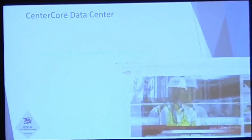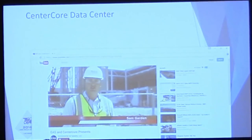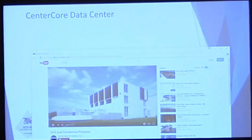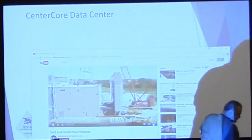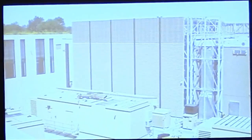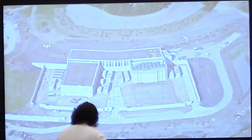I'm here on the site to show you a rapidly emerging trend in the data center industry. Behind me, you'll see the team putting together the finishing touches on the installation of a 1 megawatt tier 4 data center. Just 10 days ago, this entire structure was on the floor of our fabricator, and in 2 more days, full commissioning of the building will begin.